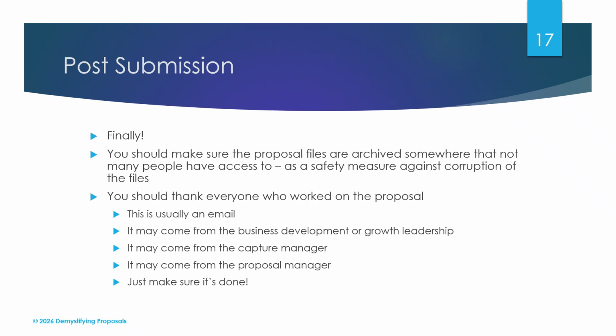Post-submission, you're finally done. Congratulations. Now, you should make sure the proposal files are archived somewhere that not many people have access to, as a safety measure against corruption of the submitted files. You may need them for evaluation notices or final proposal revisions. So you need to make sure you have an uncorrupted copy of what you submitted.